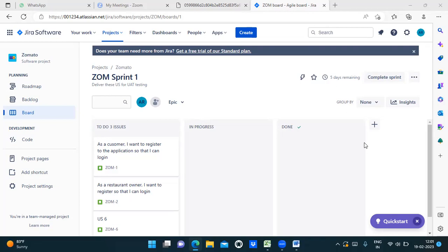Generally, the sprint will not get extended. Aarti, what happens is if you're unable to complete your user stories, you will discuss that in the review meeting. Let's assume you have 10 user stories but you're unable to finish them, and you have 2 more left. Instead of extending your sprint duration, you will put those 2 unworked user stories back into the product backlog. Again, you will work on them, but you will not extend your sprint effort. Okay, ma'am.